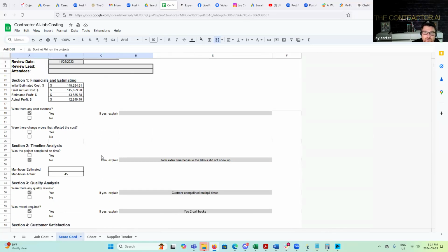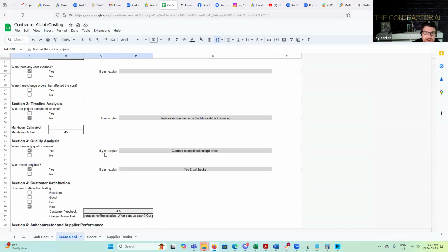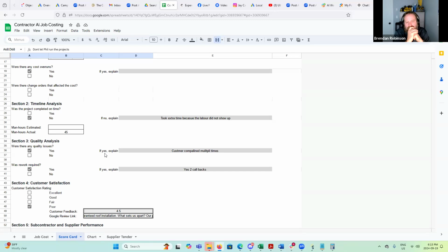They've got to know what is it exactly that we have to do. And I make it clear, right? These are the things. If I've got a perfect 10 job, that goes into the pool on top of whatever hours they've saved. That all goes in. On average, a crew leader will make 5K a quarter. That's a pretty nice incentive. I'm in Ontario, so that's also taxed differently. Yeah. So, it's a win-win all round, right?